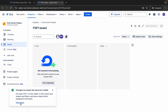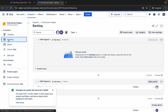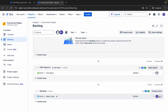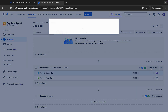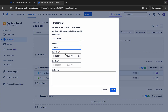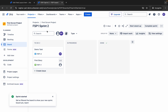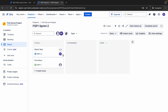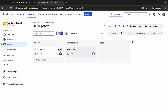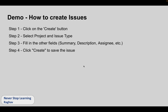This will create the issue. Because this is a scrum project, it should have gone into the backlog — and you can see it here. If you want, you can add it to your sprint by dragging and dropping it. I can also start the sprint — make it one week or two weeks. For now, I'm just doing this so the issue shows on the board. You can then move issues between To Do, In Progress, Done, or other sections directly on the board.